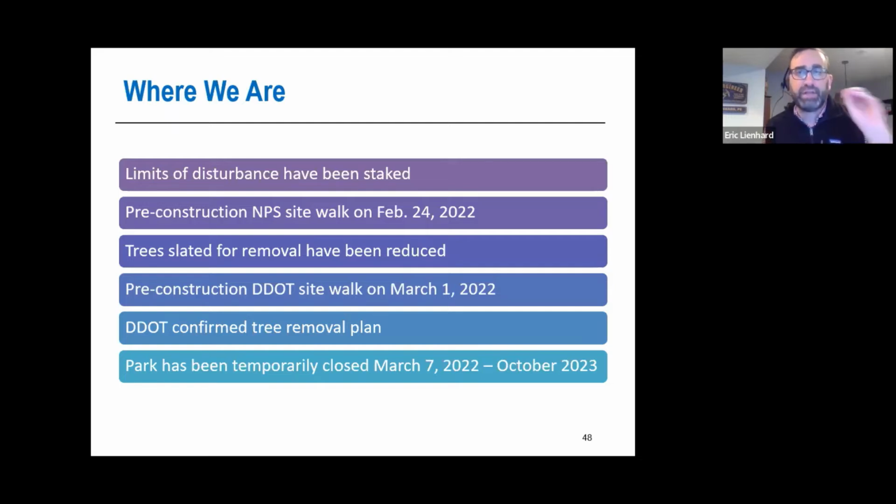And the final count, I wish I had it for you tonight. I was pressuring everyone because I knew this question was going to come up. As we were going through, the arborist was there ticking off the trees that are being saved. There was a swap out in one location: we can save this 10-inch caliber tree if we take down these two 4-inch caliber trees. So there were one or two swap outs, more saves than adds, and the adds were just the small trees.